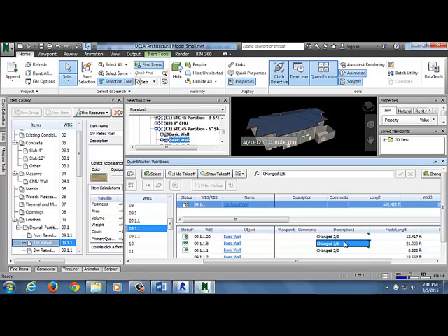When we're exporting to Excel, we're showing that volume or length or whatever it is, the difference between the 1 and 2, or it's the new. And what if it's a negative? What if it's something removed from the model? So it'll say on the right over here, it'll say deleted. Okay. So this item has been deleted.